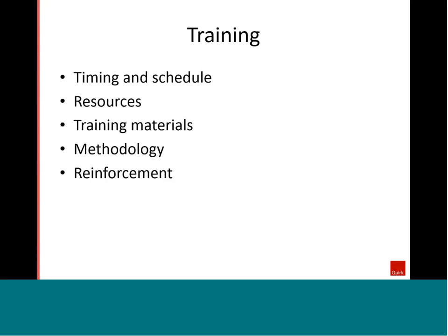Similarly, you don't want to train them too close to the upgrade or to go live, because you want to give them enough time to get enough hands-on practice. With upgrades, it's probably best that you schedule trainings closer to your go live as opposed to too early in the process.